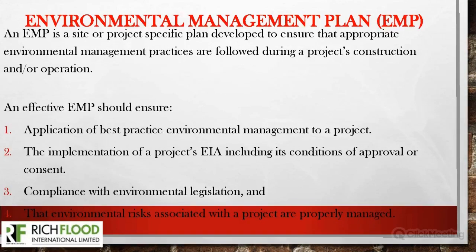Another tool that we consider is the Environmental Management Plan, abbreviated as EMP. This Environmental Management Plan is a site or project-specific plan that is developed to ensure appropriate environmental management practices are followed during the project phases, starting from the construction phase to the operation phase to the commissioning phase, all phases of the project. Environmental management plans have been designed for each of these phases to ensure that appropriate environmental management is being practiced.